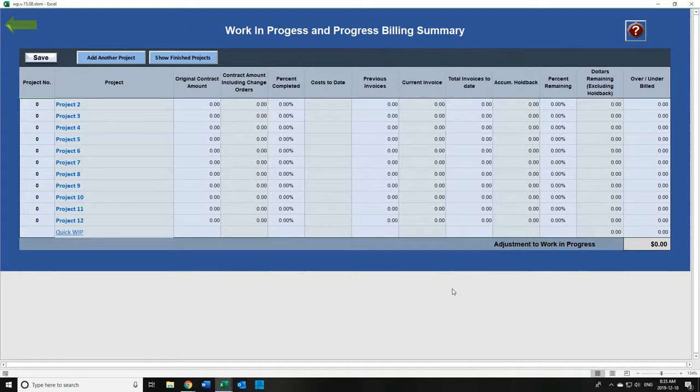By the way, if a contractor is relying on a line of credit, a secured line of credit, or if the contractor has bonding, this exercise is necessary every month, and this final sheet, this one page that we are looking at right now, needs to be provided to either the bonding company or the bank, so they can see what work in progress there is within the company. That makes sense. Yeah, that makes a lot of sense.